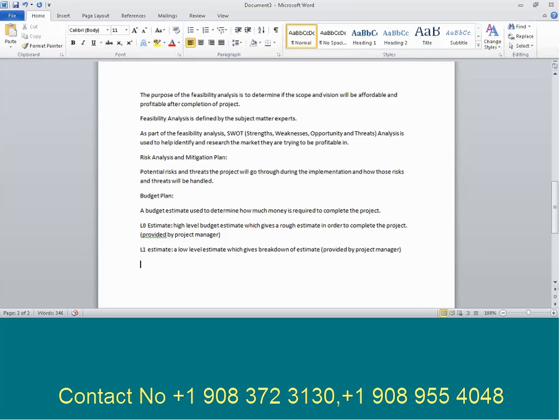Project planning pretty much is very simple and straightforward. Once they define the project scope, pretty much you are going to identify all the tasks that need to be accomplished as part of the scope, and then document all the tasks, identify the resources who are going to work on the task, and make sure that you have a start date and end date for the project. Pretty much everything is part of the planning.